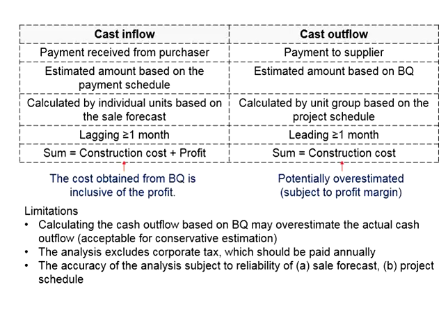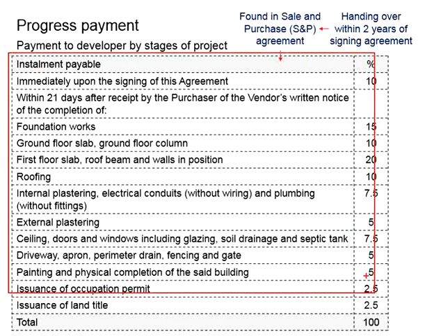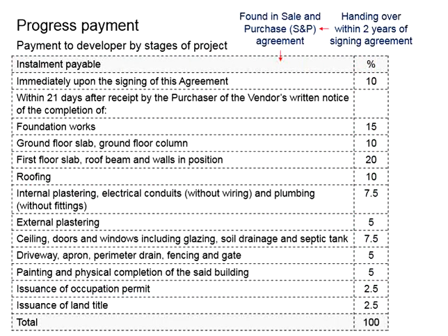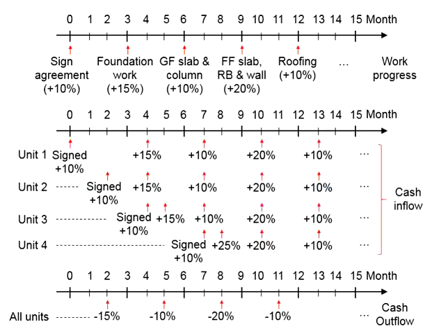the cash outflow. Please bear in mind that the computations of the cash outflow shall not be based on the payment schedules, as there may be deviations between the quantum specified in the payment schedule and the actual expenses for the project work. Now, in terms of the calculations for the cash inflow, it will be on the basis of the sales